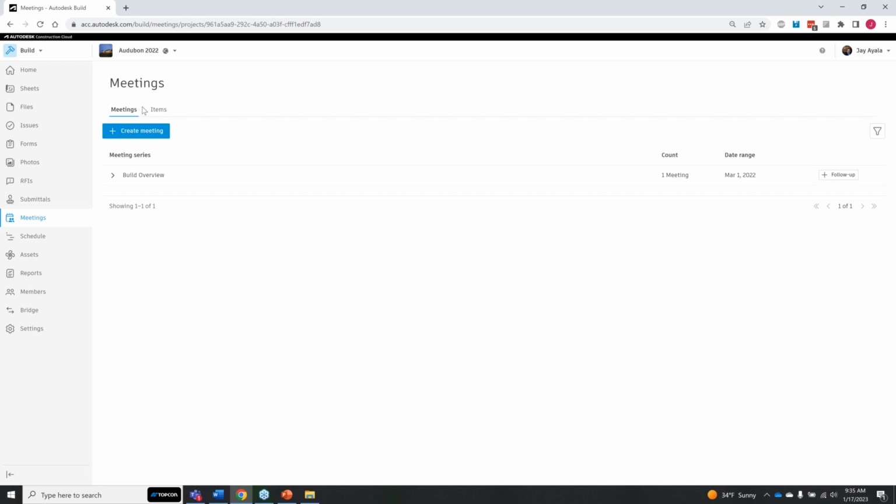So just to take a quick look at this, we got meetings and we got items. Items are a special thing, okay? Items are a result of a meeting and something getting assigned. It's going to be things like, hey, there's an action item that has to be completed by next week on Friday, because it's mission critical. If we don't get the foundations poured next week by Friday, it's going to delay everything. So mission critical things and really important things that need to be taken care of will come from your meeting minutes, looked at as action items.